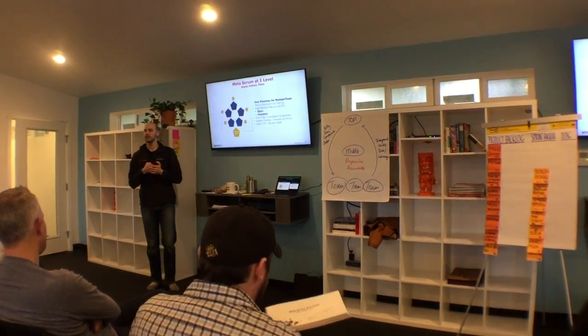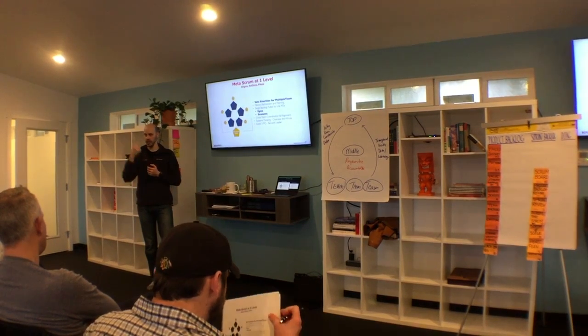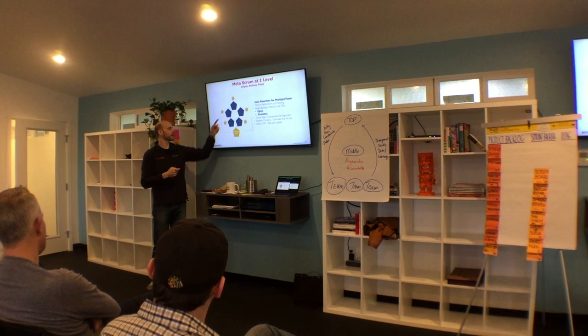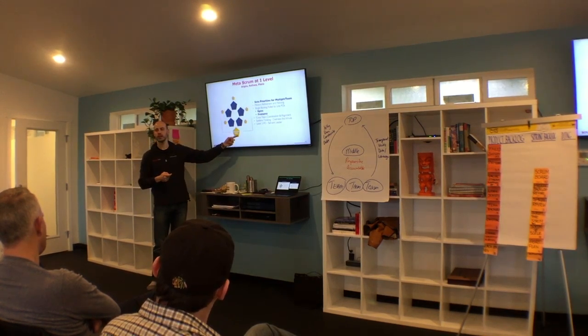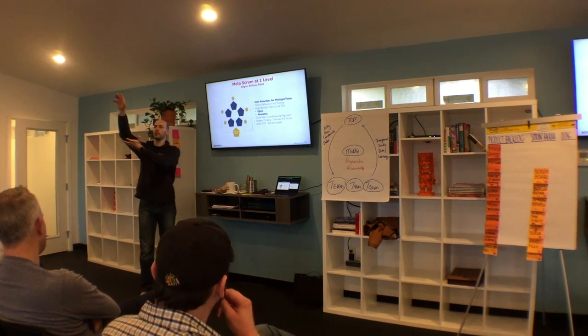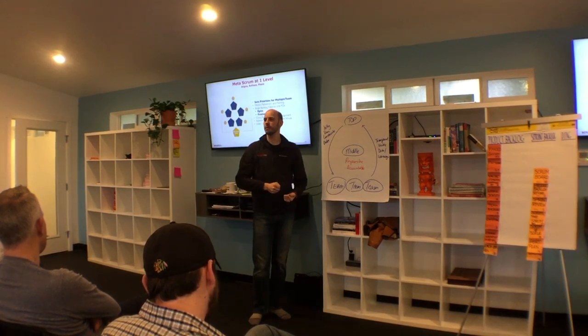Then, in which Scrum meeting does the team pull the work from the product backlog that they're actually going to execute? Sprint planning. The product owners also meet in what's called meta-Scrum sprint planning, or Scrum at Scale sprint planning. It's where they pull from the parent backlog and take chunks to their team. Now those chunks may be very new to the team.